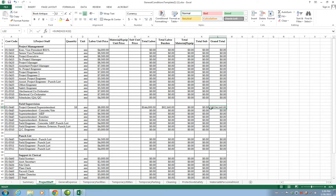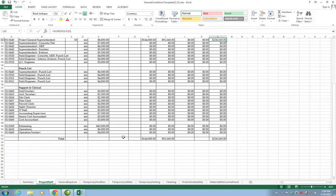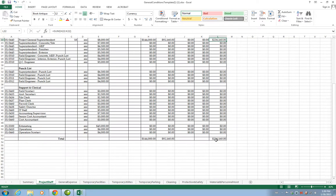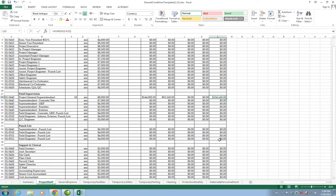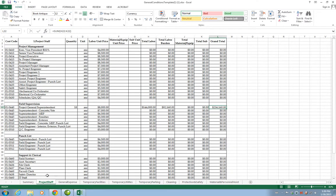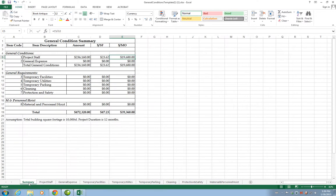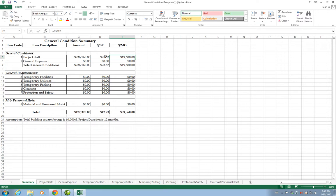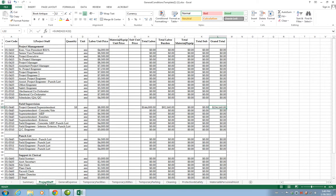This cost gets a total down at the bottom of the sheet and then it is linked back to the summary. Now we see that the summary has an amount of $236,160 for project staff, which in a 10,000 square feet building will transfer into $23.62 per square foot and $19,680 per month.